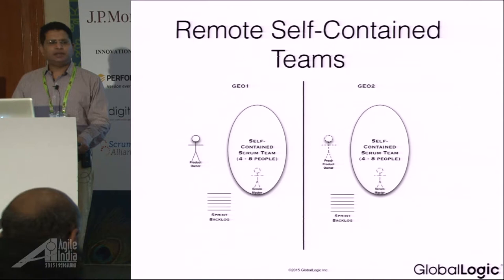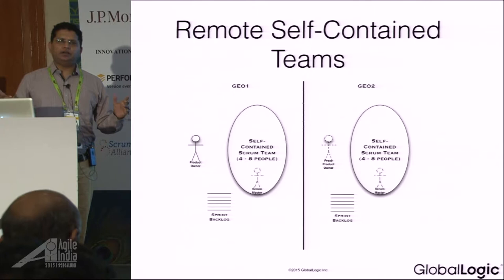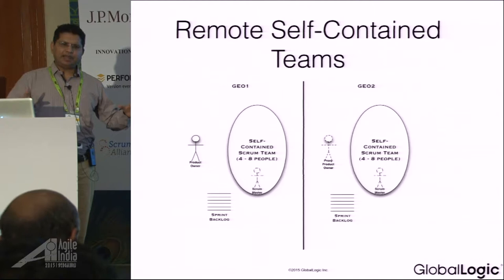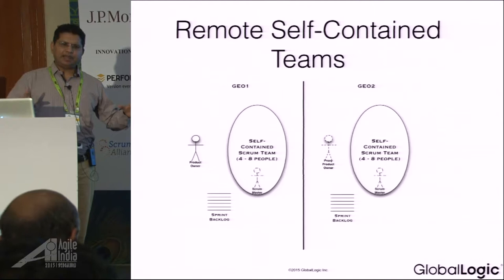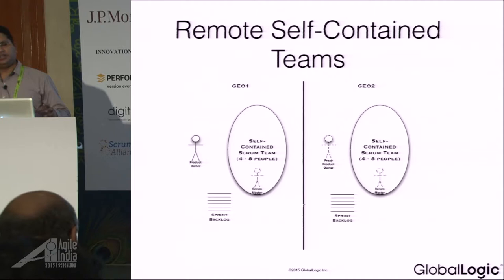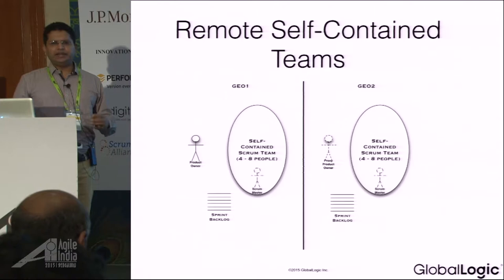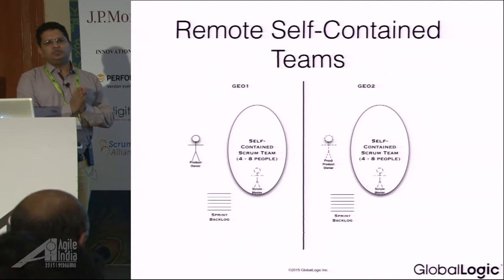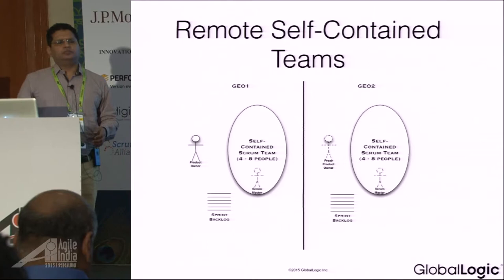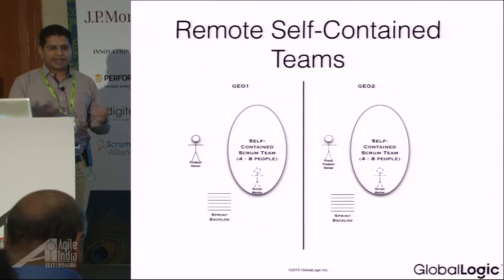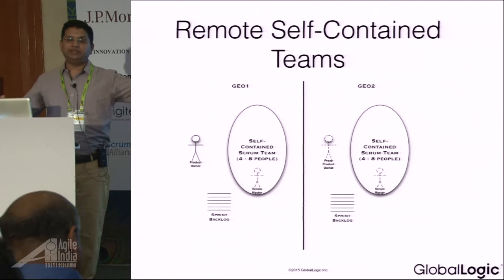The whole governance model is there because of that. That's where you need courage to take certain steps. For example, I was working in a team where one team was creating the backbone of the entire architecture and another was working on the front end. We made a decision: we're already done with this backbone work, so let's divide the team — move three people to the front-end team and start working. You have to take decisions based on what is happening right now, instead of saying this team will continue to be there forever.